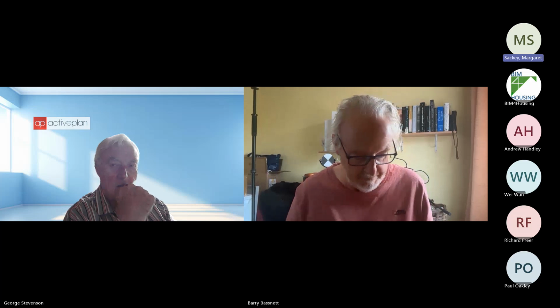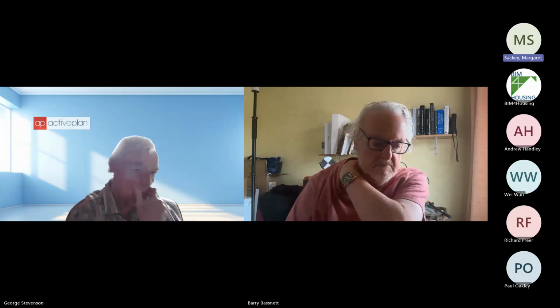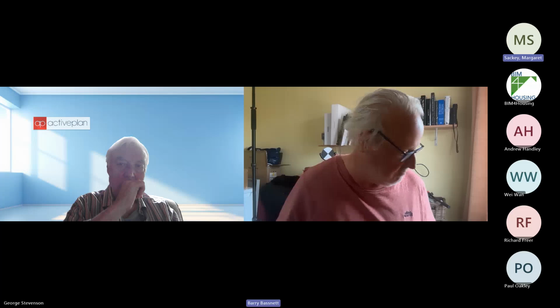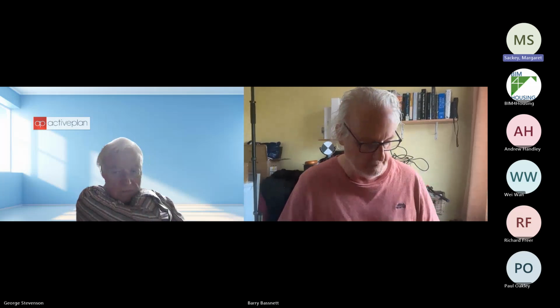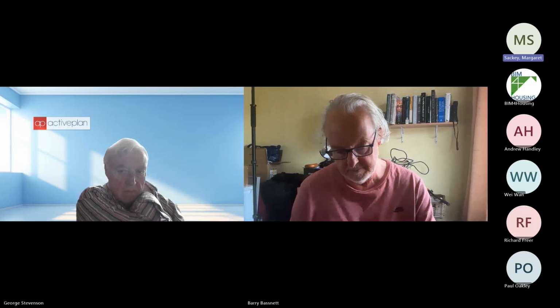So, Margaret. Yeah, just to pick up on Barry, I'm so loving your discussion and your input. The CDM Regulation 12, I don't know if you realise it, but the principal designer and principal contractor in law, in statute, if you read that guidance I put in the chat, plus all duty holders, have duties to make sure in relation to the plan and the file, which includes as-built drawings, that it's correct. In law, CDM Regulation 12.